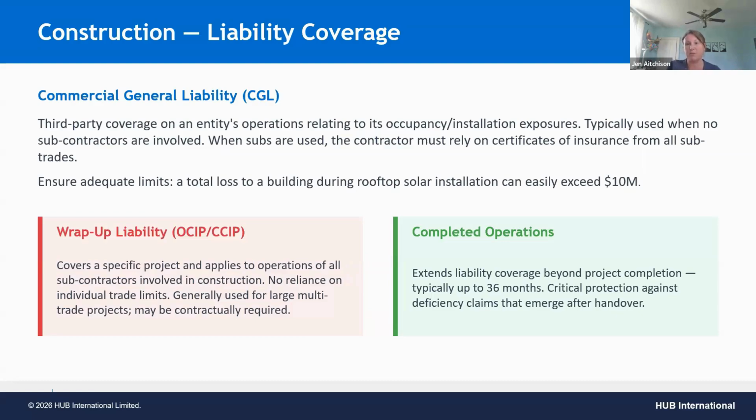As long as you have a certificate of insurance and you're added as additional insured, even if the subcontractor does not respond, and we've seen these things play out a few years after an installation has occurred, if you have a certificate of insurance and a contract that requires these things, then you can go directly through or around the contractor and take hold of the benefit of the insurance policy that they put into place, as long as you're an additional insured and those contracts line up to reflect that.